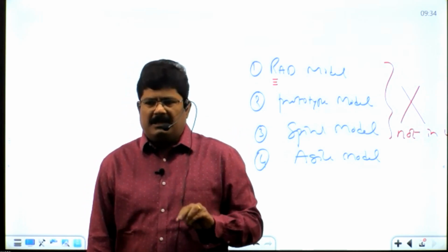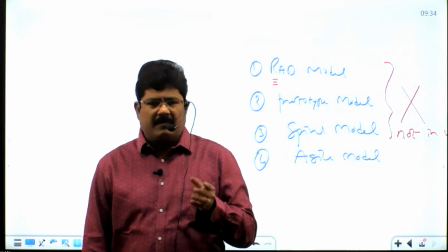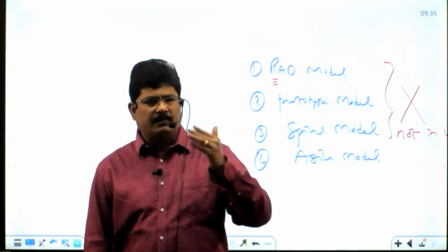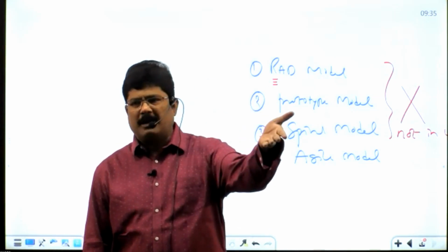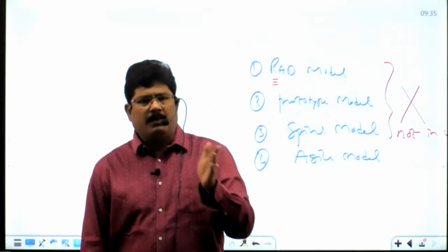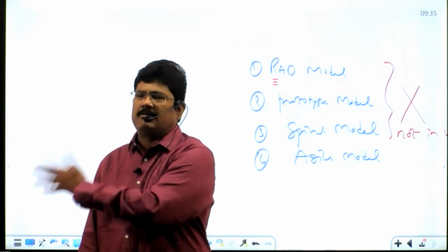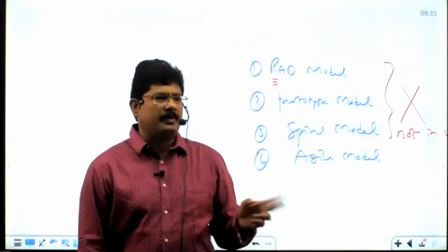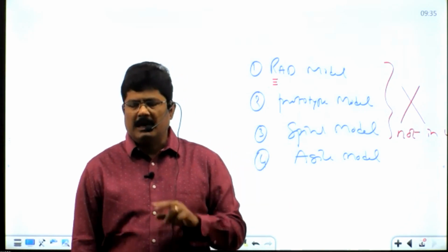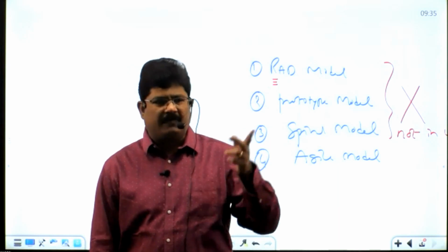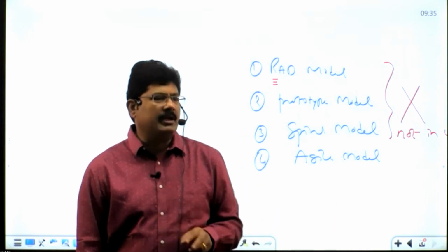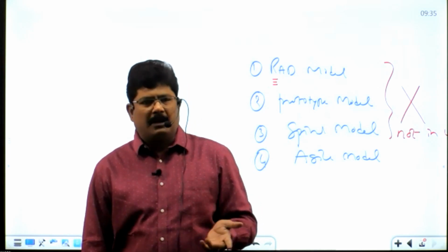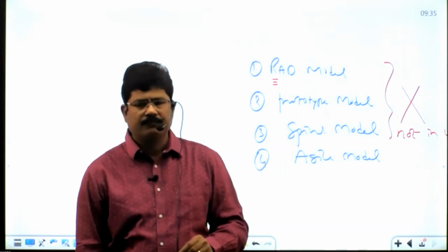For developing a big application where the requirements are very complex, first make a prototype, demonstrate it to the customer, get it approved, and based on the prototype, the rest of the software development activities are carried out. Such a development approach is called the prototype-based development model. Advantage: no chances of project failure because the customer already approved the simulation. Disadvantage: making a prototype also takes our time and budget.